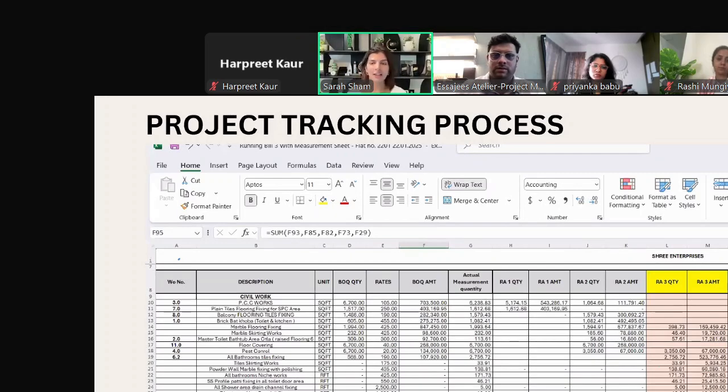So the pre-handover running bill is very important because after handover, people don't want to pay big amounts of money. That's why you have to keep only 5% or max 10% for post handover. And when there's a large escalation, you have to do that running bill and get it cleared before. Once the clients are in the house, they're just going to argue with you because they've got exactly what they wanted and say, why this, why that. So RA3 is the most important one.